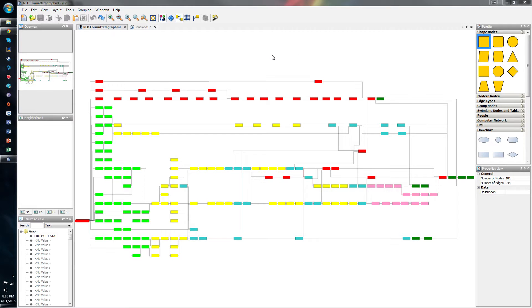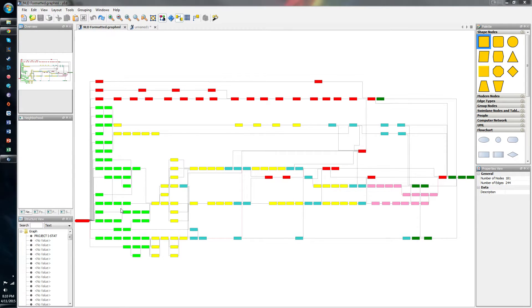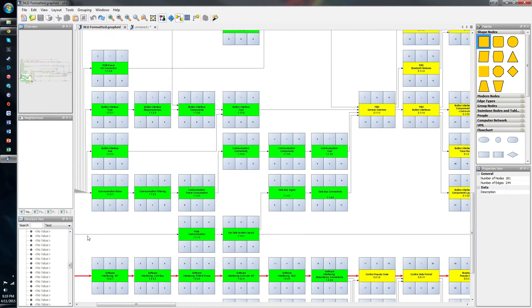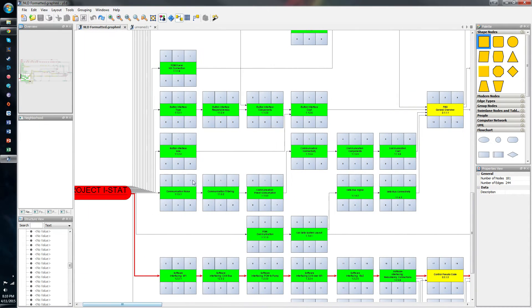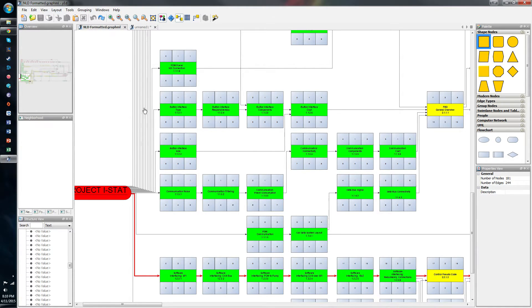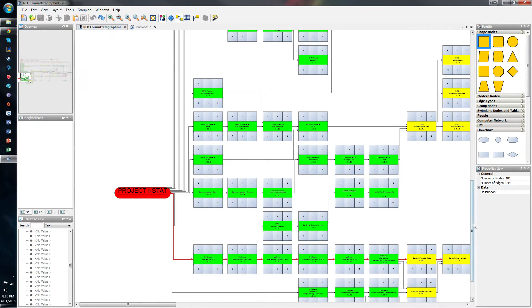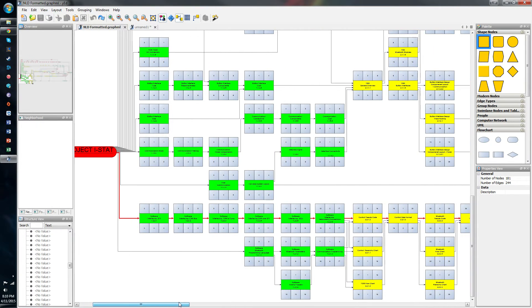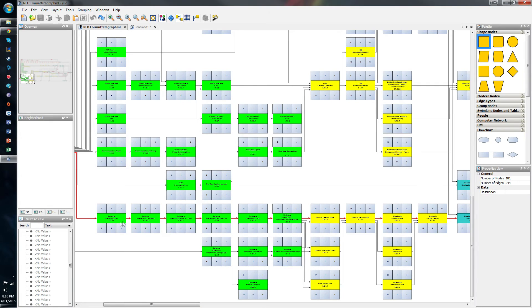Now that you've installed the yEd tool, I'm going to show kind of an end product based on what we have done in our project for what your NLD can look like. Here's the most zoomed out. We can see we have different colors of these boxes. These represent different kinds of tasks, such as hardware, software, documentation, and others. If we zoom in, we can see that we have each of our little blocks with our six areas to place our numbers for your forward and backwards paths. We also have our project start, as well as all of our connecting arrows. We can also see that we have a highlighted red line. That's to indicate our critical path. You can do many other things to indicate your critical path, depending on what you prefer. You can put a red border around the box, many different things.